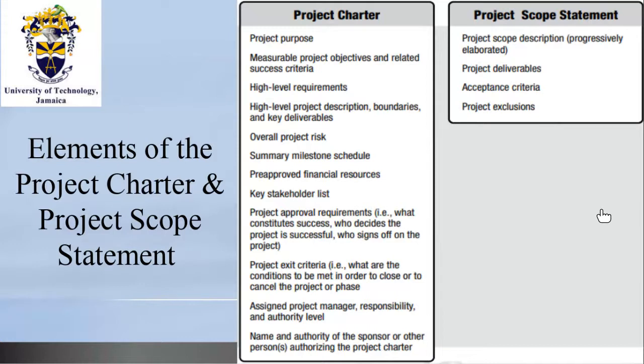Now, what are the exclusions for this project? This scope of work for this contractor, and you put as an exclusion furnishings, blinds. So that contractor is not responsible for carrying blinds and putting them at the windows, because you're going to get a next contractor to do that. You put as an exclusion furniture. You don't want this particular contractor to procure and install furniture, because you're going to get another company that specializes in furniture to do that. So everybody understand what exclusions are now?